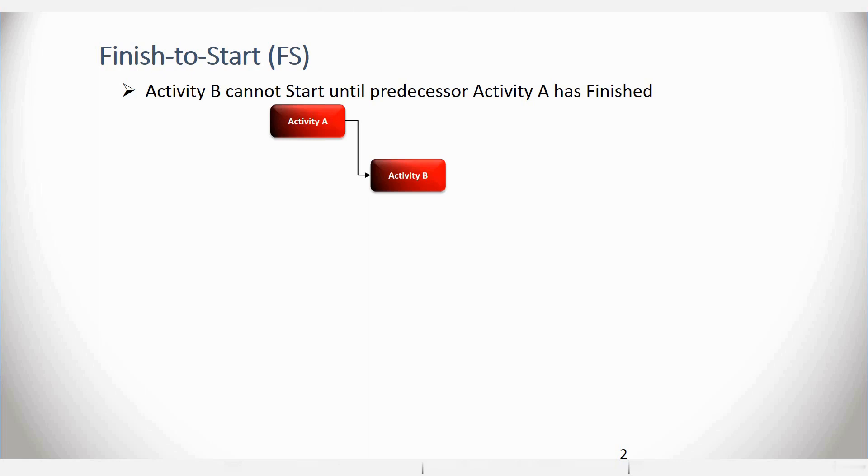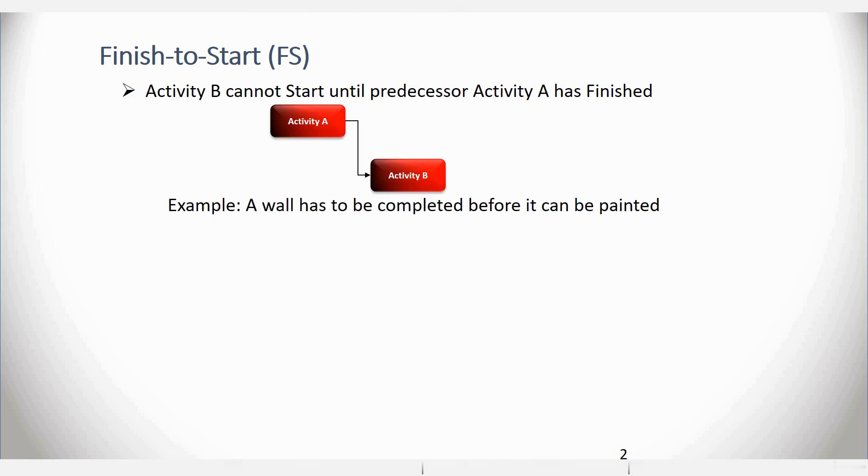In this particular example, you can see two activities, Activity A and Activity B. Activity A has a Finish to Start relationship with Activity B. What it means is that Activity B cannot start until its predecessor, which is Activity A, has finished. For example, a wall has to be completed before it can be painted.